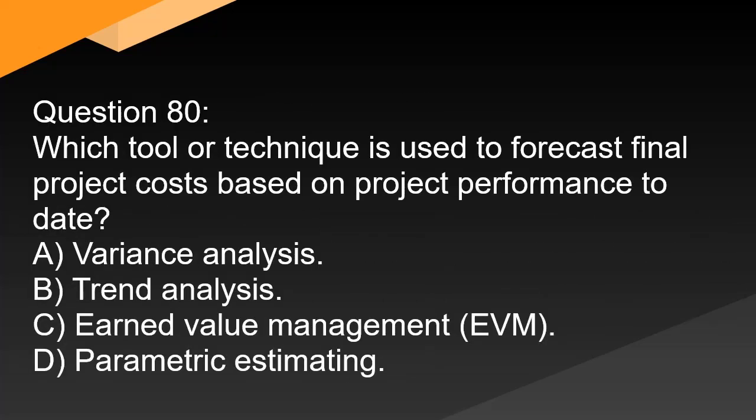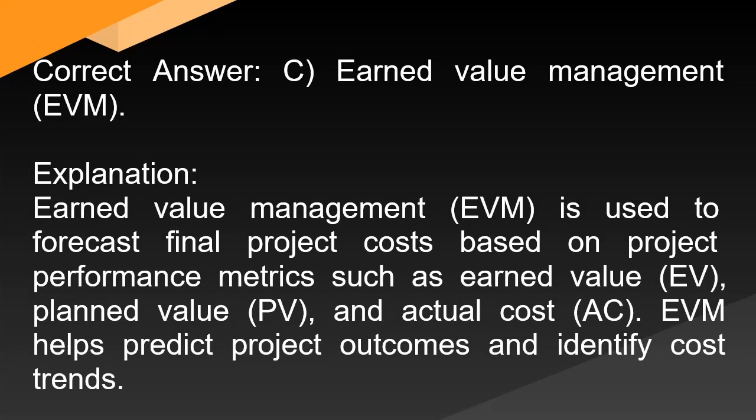Question 80: Which tool or technique is used to forecast final project costs based on project performance to date? A. Variance analysis. B. Trend analysis. C. Earned value management (EVM). D. Parametric estimating. Correct answer: C. Earned value management (EVM). Explanation: Earned value management (EVM) is used to forecast final project costs based on project performance metrics such as earned value (EV), planned value (PV), and actual cost (AC). EVM helps predict project outcomes and identify cost trends.